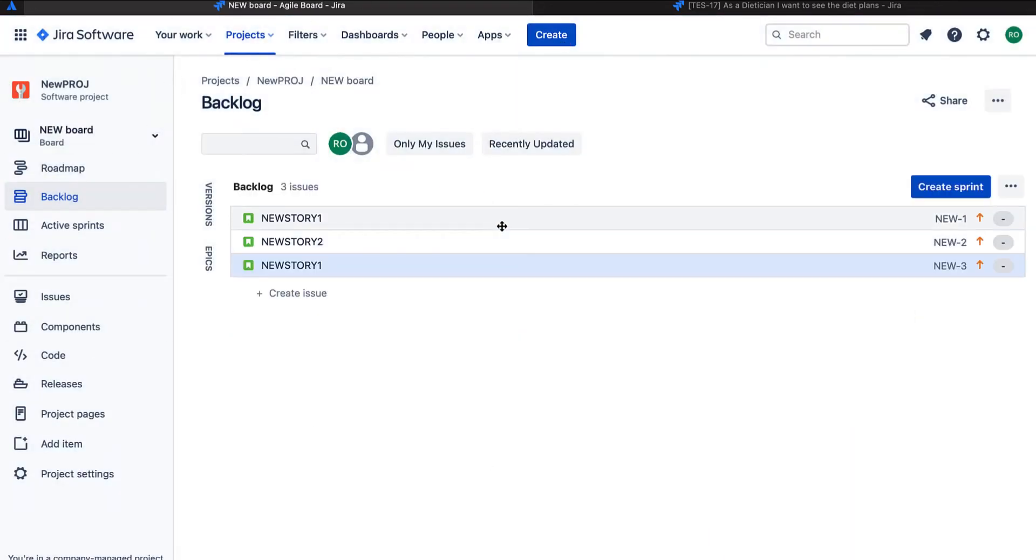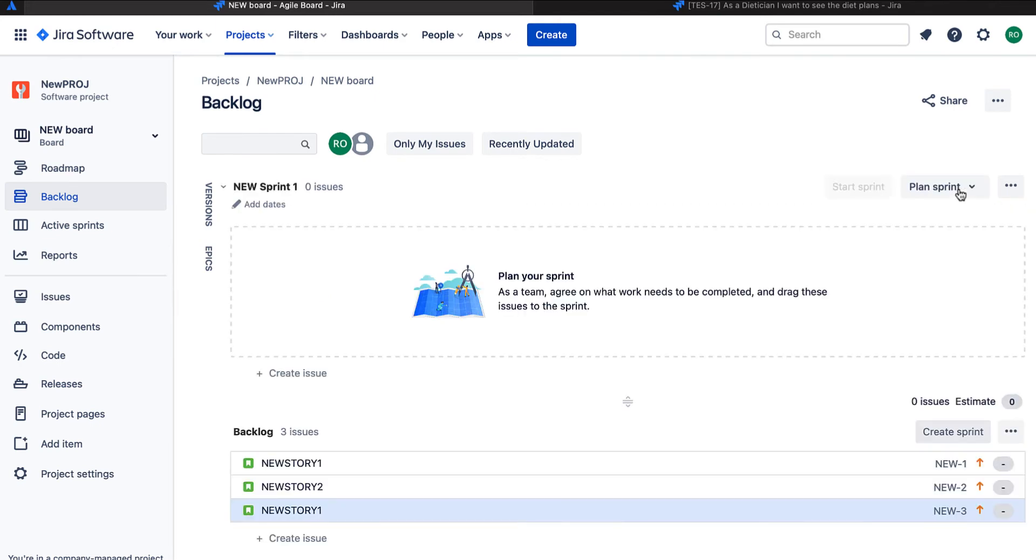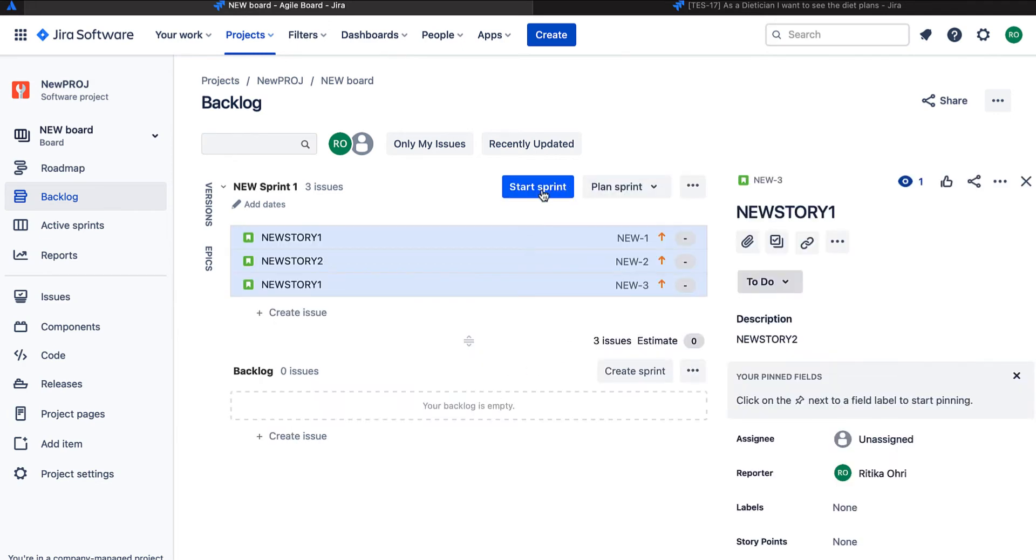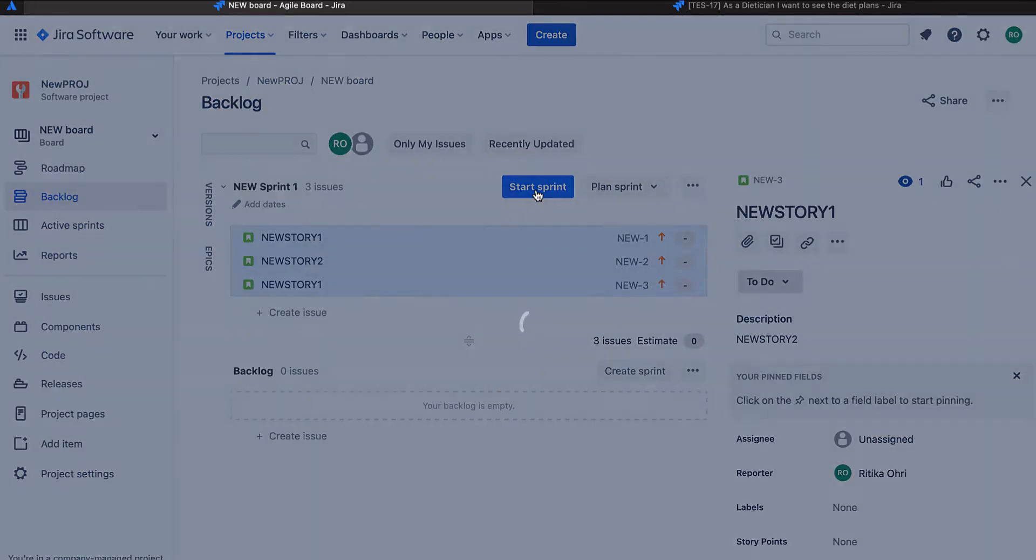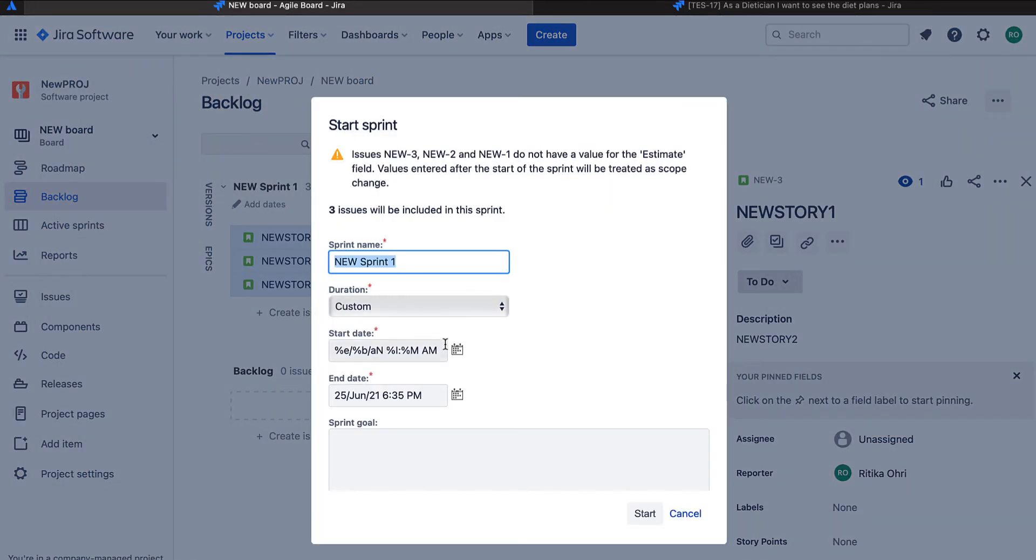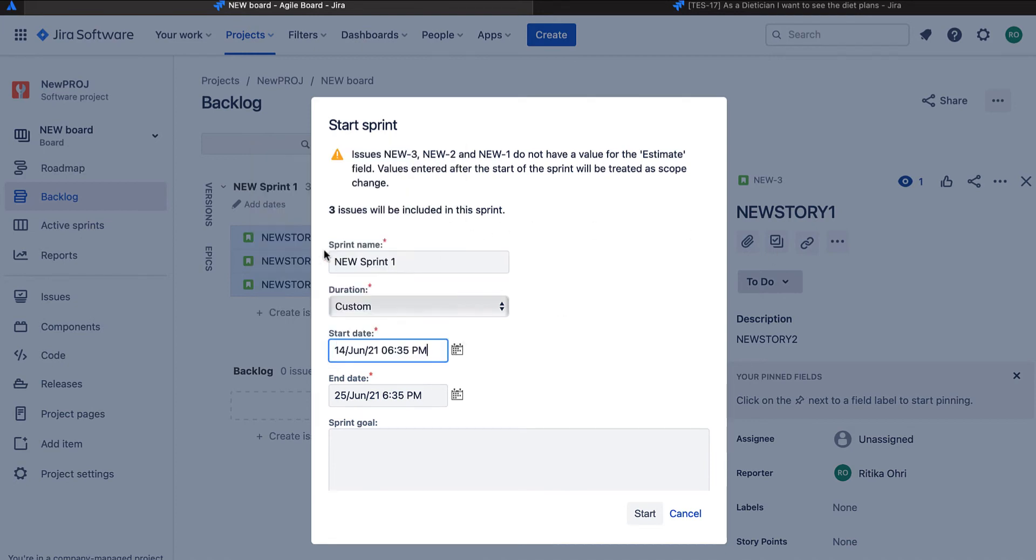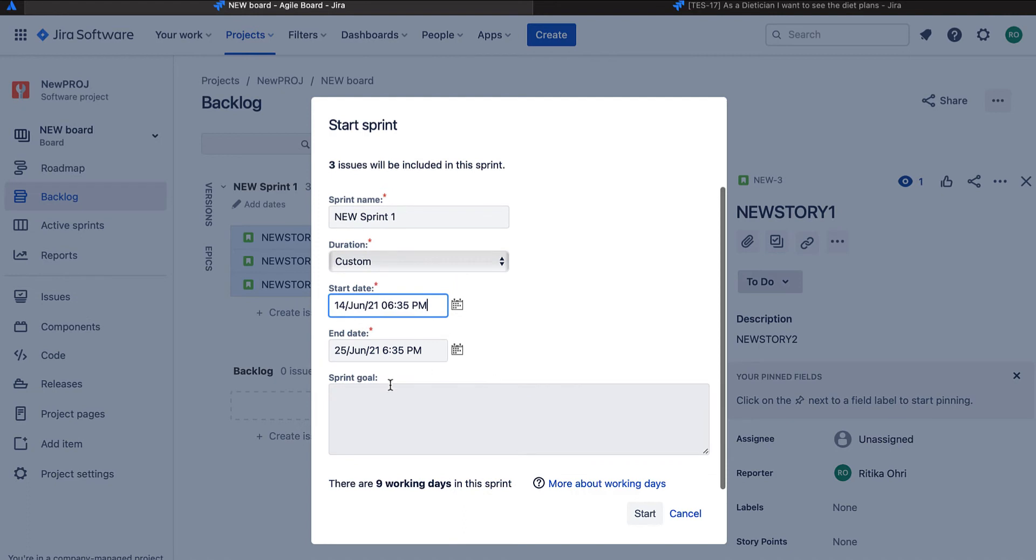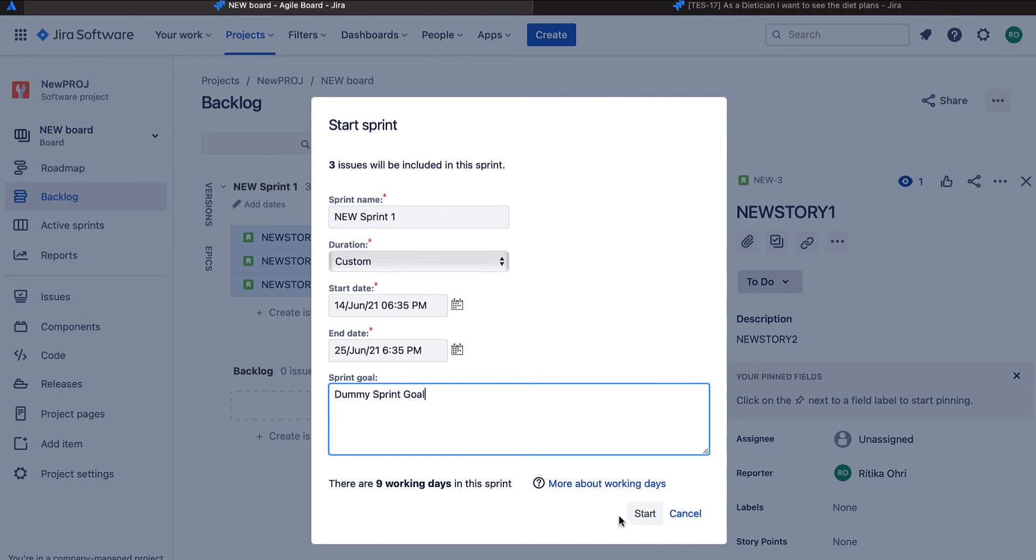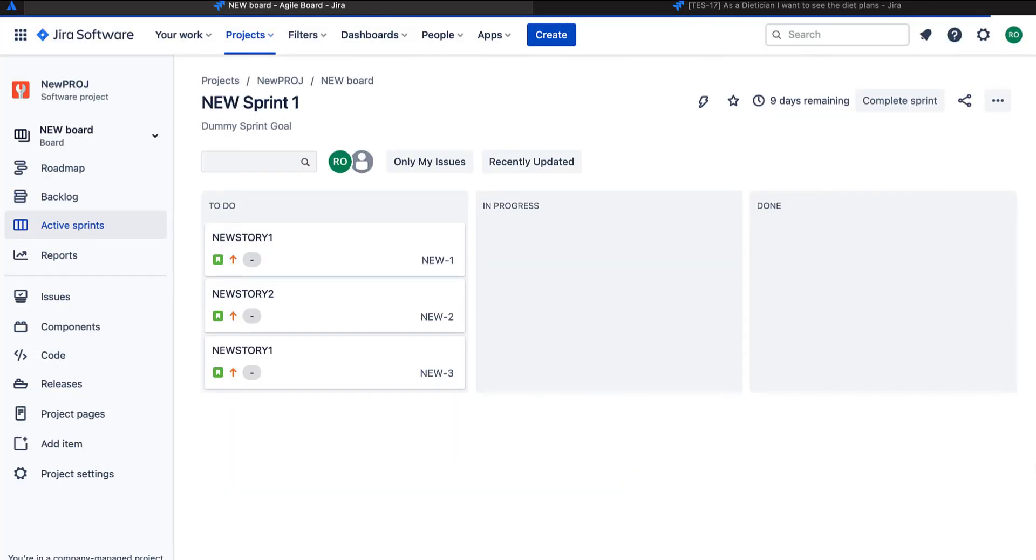Once the issues with the minimal details are created, I will go ahead and create a sprint because the stories are not added yet. When sprint is not started, we won't be able to see our board. Let me select a date. I'm just giving a dummy sprint name. Our board has been set up now.